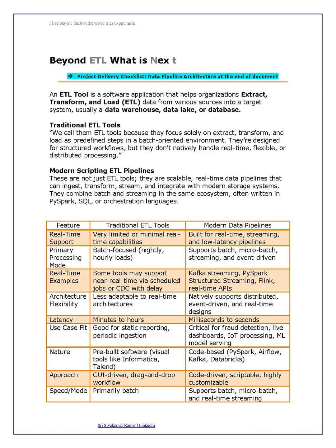Okay, and then the final stages seem to be about getting ready to build and making sure it lasts. Implementation readiness and governance and handover. That's right. In implementation readiness, you finalize your orchestration strategy. How will these pipelines be scheduled and monitored? Using tools like Airflow, or maybe cloud-native schedulers like AWS Step Functions or Azure Logic Apps. You need to confirm integration with your cloud-native deployment tools, things like Terraform or CI/CD processes. You absolutely must design automated testing for your pipelines, data quality checks, integration tests, and establish operational dashboards and failure alerting so you know immediately if something goes wrong.